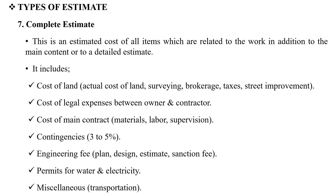The next type of estimate is the Complete Estimate. This is an estimated cost of all items which are related to the work, in addition to the main content of the detailed estimate.